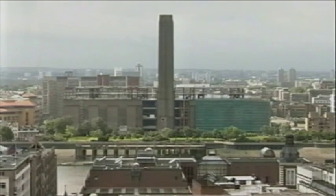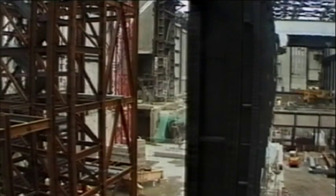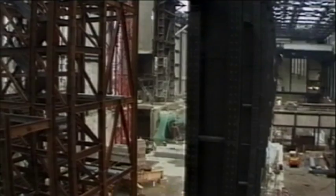What prevents it happening in future? Well, once bitten, twice shy. We've been around as a business now for 50 years. This is the first and only time we've been in this type of situation. We sure as hell don't intend being there again. The steel structure had finally taken from December 1997 to July 1998 to erect, more than twice the 15 weeks Rowan promised.